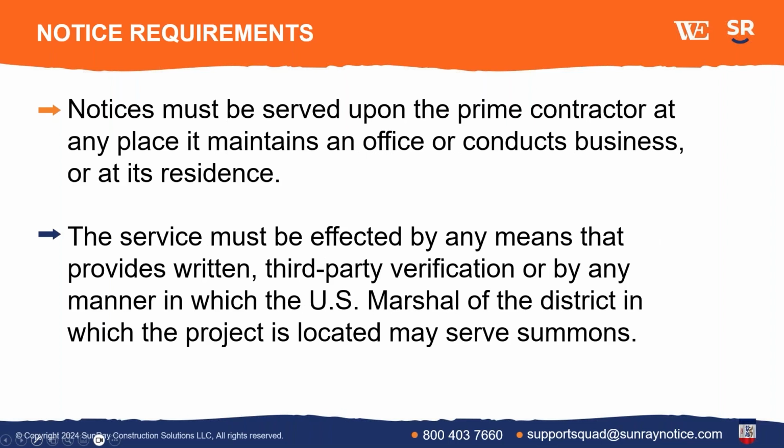Now, what do you do with this notice? You prepare this notice. Who do you send it to? Well, it has to be served. It says delivered in the statute. Delivered to the prime contractor at any place it maintains an office or conducts business or at its residence. Now, the courts have held that this is a means of service issue, and they are much more forgiving and not strict on how the prime contractor gets the notice.